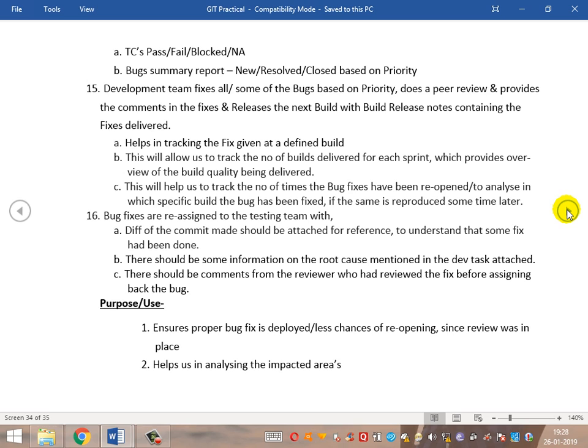In parallel, the development team may have already fixed some bugs, tested them, and is ready to deploy those bug fixes — they are ready for phase two of the build deployment. The development team prepares a new build release mail with release notes. These release notes contain information on which bugs have been fixed and deployed to the test environment. This helps in tracking the bug fix at any defined build — if the same bug is reopened later, we can trace back to the release notes to see where it was exactly fixed earlier.